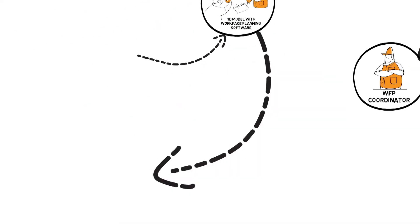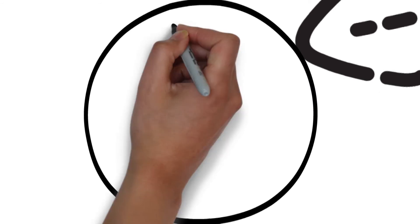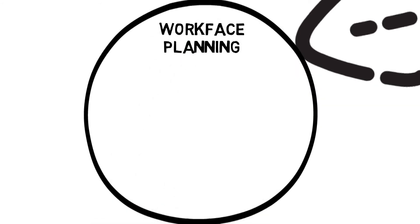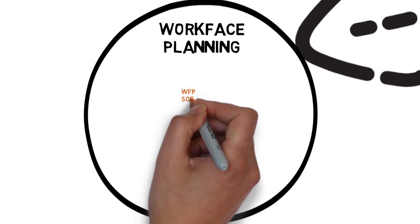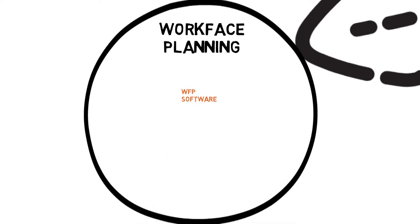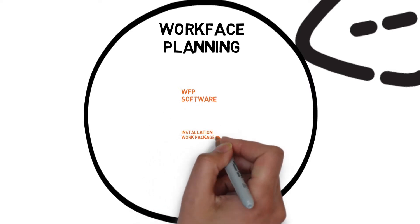Moving into construction, the work face planning coordinator, working with the construction contractor, develops a department of work face planners and trains them on how to use the software to create installation work packages.